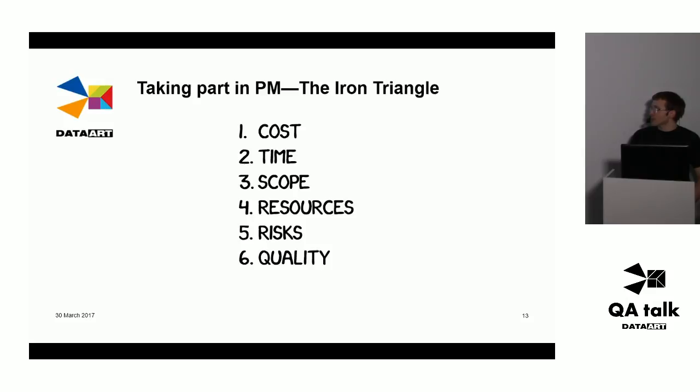You must understand that the more items we fix here, the more the rest of the items are kind of automatically defined. So if you imagine an absolutely terrible project with everything on top fixed, you will automatically get quality reduced. That's simply a law of physics. You can't do anything without that.